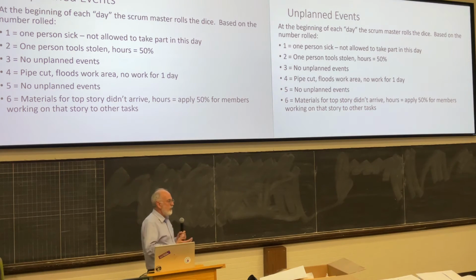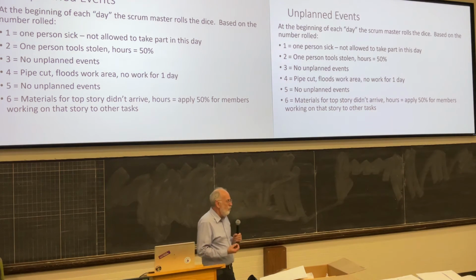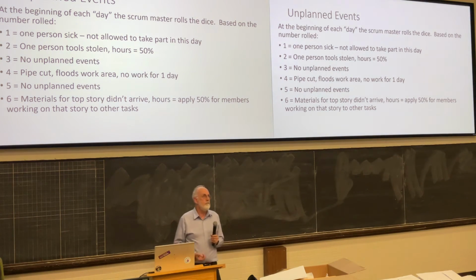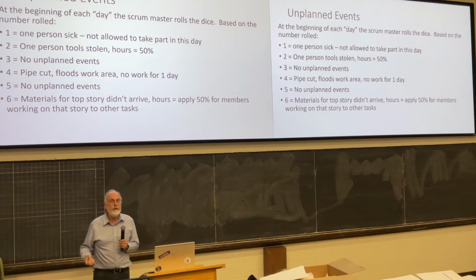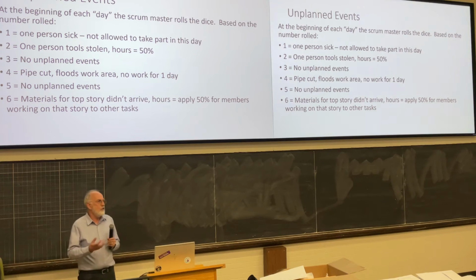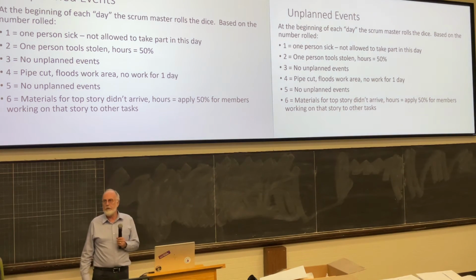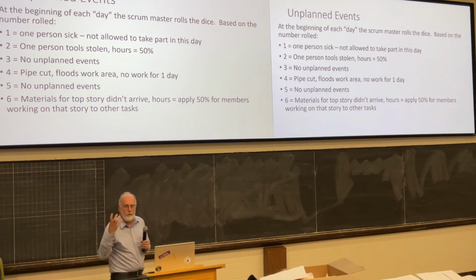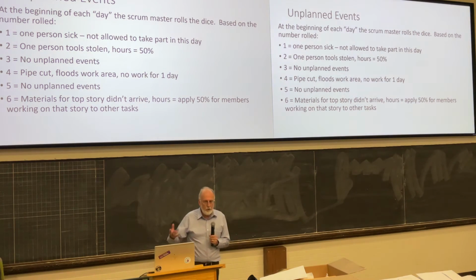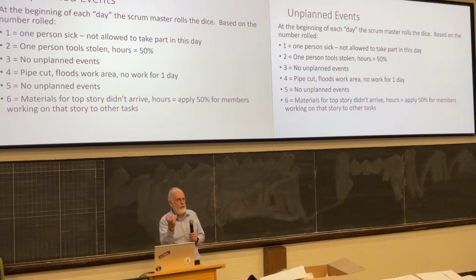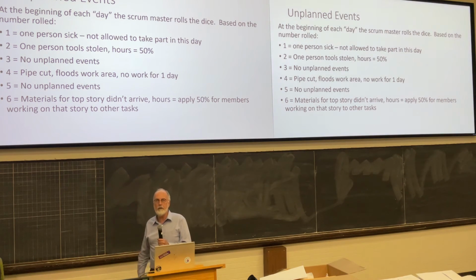So this is just to give you an idea of how, in the real world, stuff's going to happen. There's another word we use other than stuff, but without politeness, we'll call it stuff today. Stuff will happen that's going to disrupt what you can accomplish in your week. So this will just help formulate that in your head as you're going forward. So what you want to try to do is build a little bit of a buffer into your sprint to try and account for that. But not too much of a buffer, right? You don't want to just have one story in there and you complete it, and you've got half a day left to go.